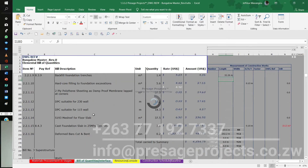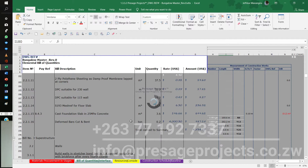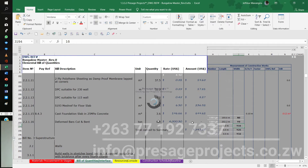Once I enter that, I've got all the other information — the DBC measurement, enforcement, deform bars. There are many formulas in there. For instance, if I enter zero I get zero quantity, so I can determine bar sizes. With an R10 round bar and a Y12 twisted bar, I get about 300 kilograms — at $4,000 a ton, that's roughly $1,100 to supply and fix. That's in US dollars.